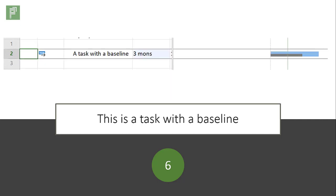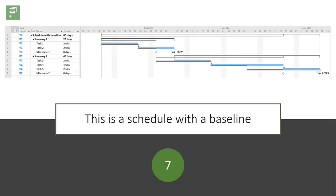This dark section, that is actually the baseline and this is a schedule with a baseline. It represents the original state of your approved or original version of the schedule.